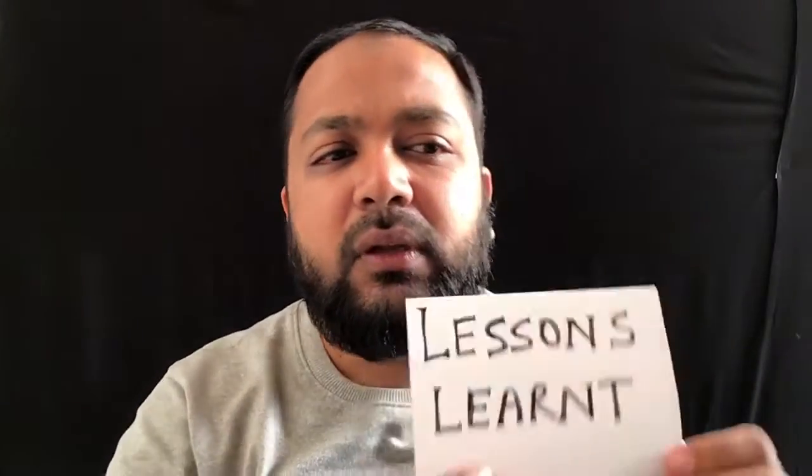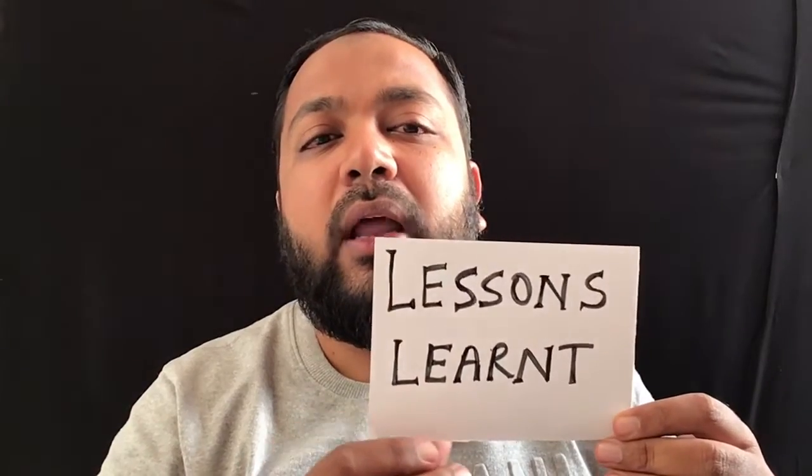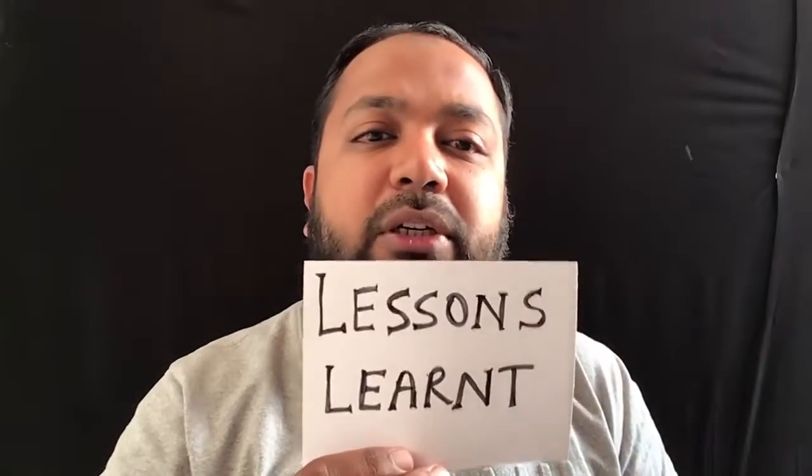We track it in some document, and then we see that during the quality the review has not come good, or when the particular deliverable is given to customer as a feedback and the client came and told it should have been done in this way. We record that. Now in which document do we record this? We record this in the document called the lessons learned. So lessons learned document is one document that we will go and update information throughout the project,